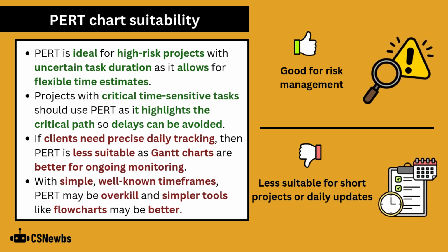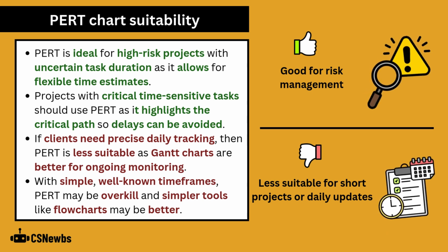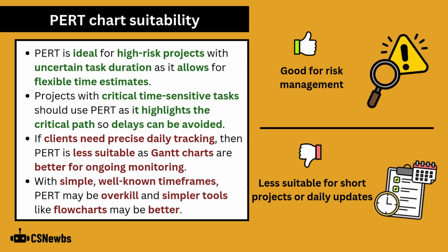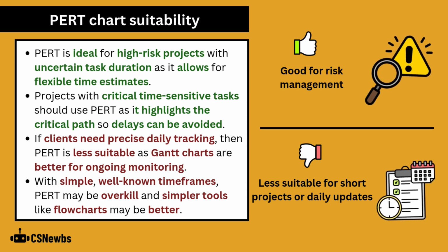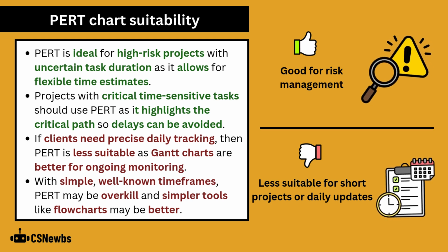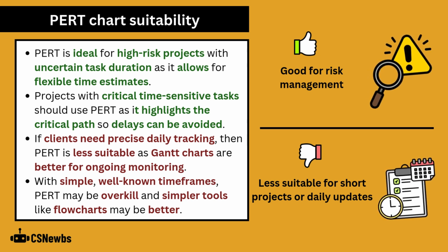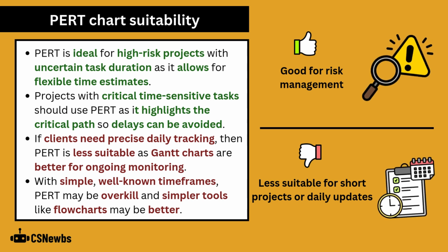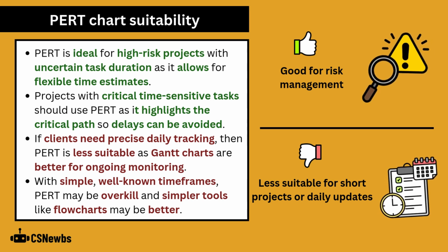PERT charts are ideal for high-risk projects with uncertain task duration as it allows for flexible time estimates. They're also good for projects with critical time-sensitive tasks, as it highlights the critical path so delays should be avoided. If clients need precise daily tracking, however, then PERT is less suitable as Gantt charts are better for ongoing monitoring. And with simple, well-known timeframes, PERT may be overkill and simpler tools like flowcharts may be better.